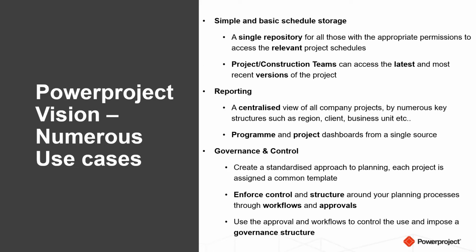There is a function in Powerproject and in Vision to baseline, and Vision can take control of that baselining process so it meets your workflow within the business of when baselines are created, but also previous versions can be used as well.